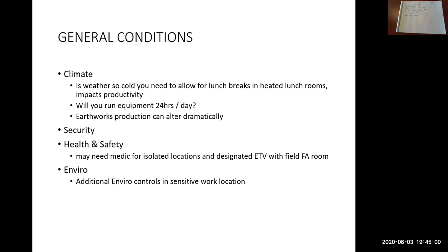So if that's a requirement, somebody's going to tell you that, so that you need to allow for more fuel being used, right? You're obviously burning more gas if you're running equipment 24 hours a day.